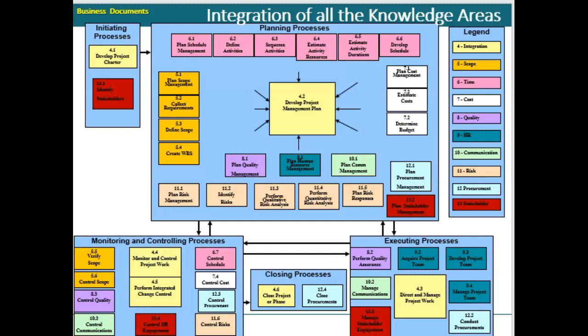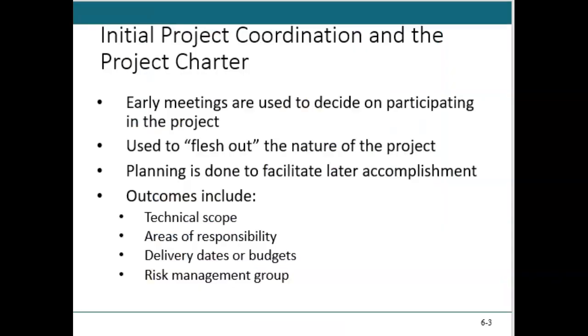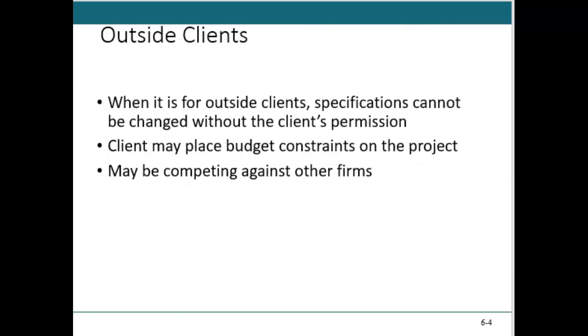I also want to point out that in weeks one and two, we talked about business documents. Notice that's in the top left-hand corner of the slide, because business documents aren't part of the project — they're done with the C-suite and the sponsor. They give you your business case, which has your feasibility study and your benefits management plan. Those documents start and kick off your project with the project charter. So the initial project coordination starts with the project charter. This is where we flesh out between those business case documents, but before the project plan kicks off. To do that, we're going to have to talk initially to some key stakeholders. We talked about stakeholders in week two — very important.